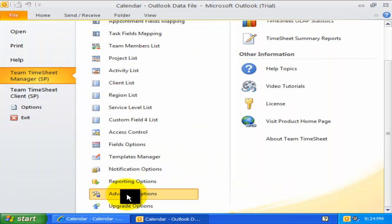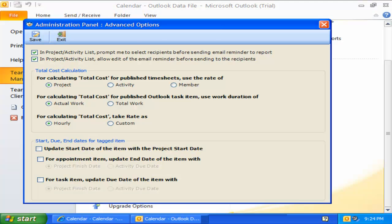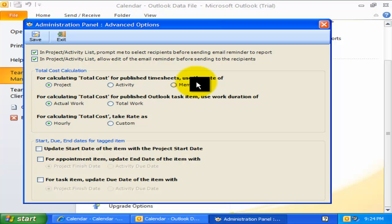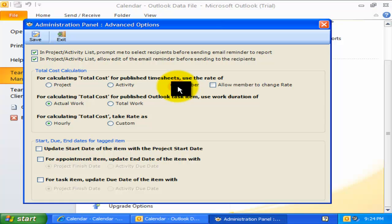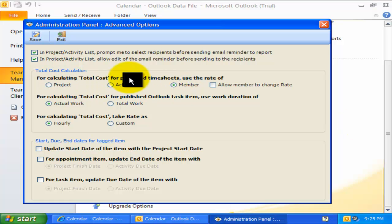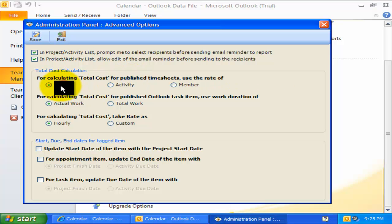Now let us explore the advanced options available. For calculating total cost for billing and payroll purposes, administrator can use the project rate or the activity rate or the member rate. The total cost is calculated automatically when members report their timesheets to SharePoint. By default, the rate for project is used.